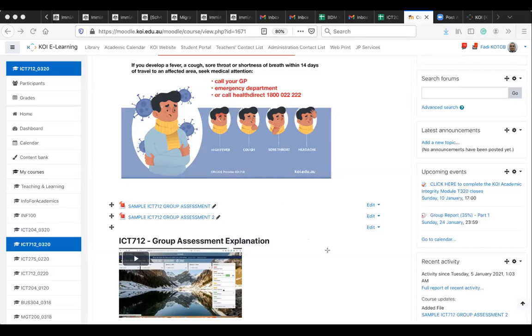And this is crucial. For every user story, you need to make sure that there's an acceptance criteria. How do we know that that user story that is listed here is actually going to be delivered? Well, it's saying, what's the acceptance criteria? Well, given that I'm a director user, when I submit my details and Australian Government Officer ID, a unique login credential should be allocated to me so that when I want to log into the portal, it should log in with superior authority to have control and access to everything.